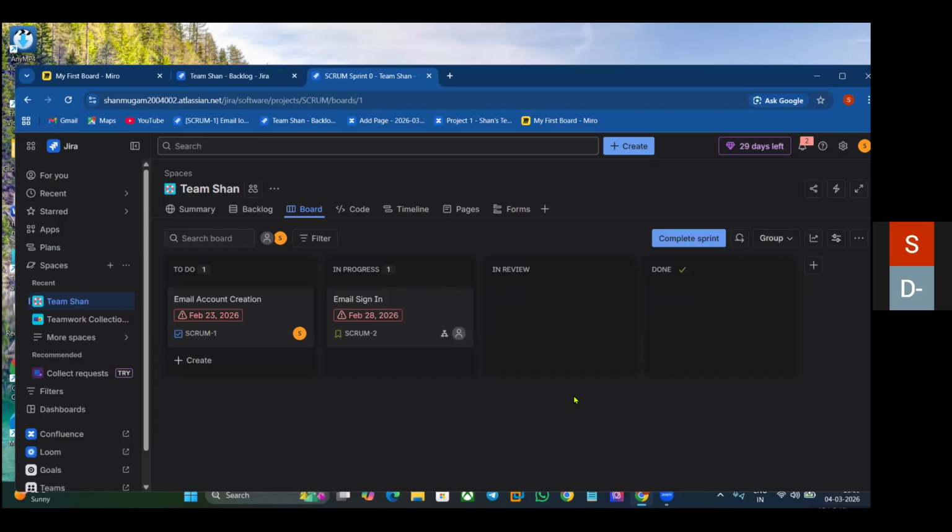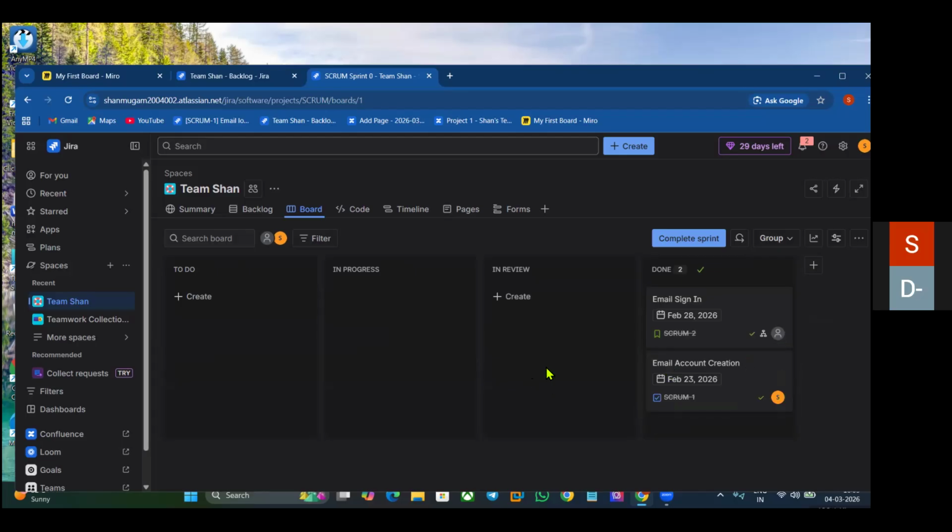Okay. So mark these items as done. Like one is in progress, right? Can you drag everything to done? Okay. Yeah. This also? Yeah. Because what is it, it is considered as spilled over. Spilled over means our sprint has completed. Like today it's going to complete, but still some tasks are pending on our board, right? So that's why it's saying overdue.